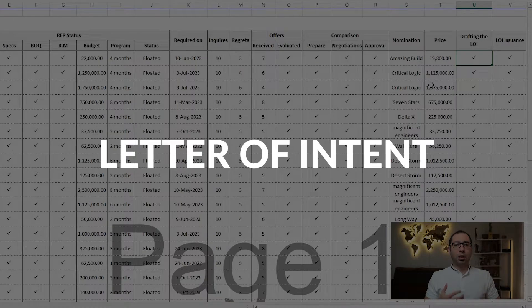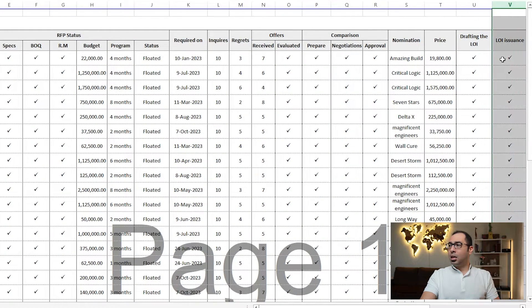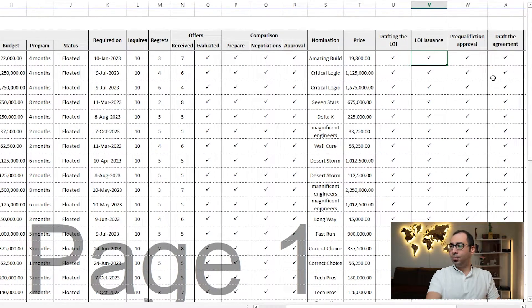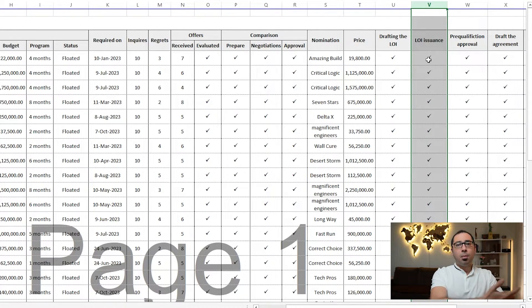After selecting the price, we move to drafting the Letter of Intent (LOI). The LOI is a document issued to the subcontractor stating that we intend to award them this work at this price and these payment terms, but subject to consultant approval. With the LOI in hand, the subcontractor goes to site, submits pre-qualification documents to the project consultant, and if the consultant approves, we will make the contract. We put ticks in the LOI drafted and issued columns.